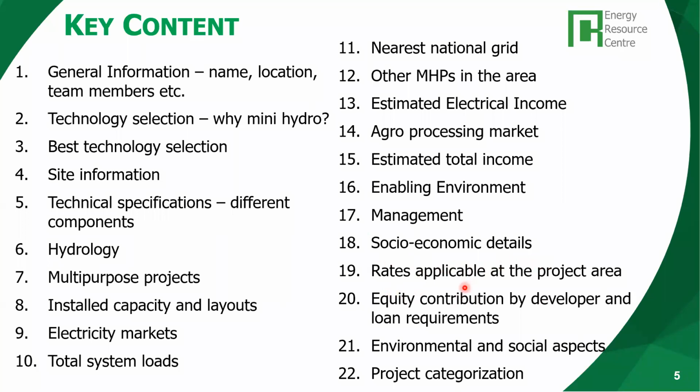When I talk about rates applicable, I'm talking about the unit rates for the construction material, for the labor, for transportation, and other unit rates. Cost per unit at the project area has to be decided. Then